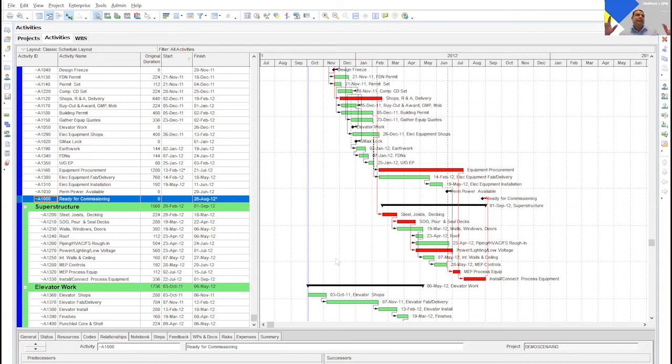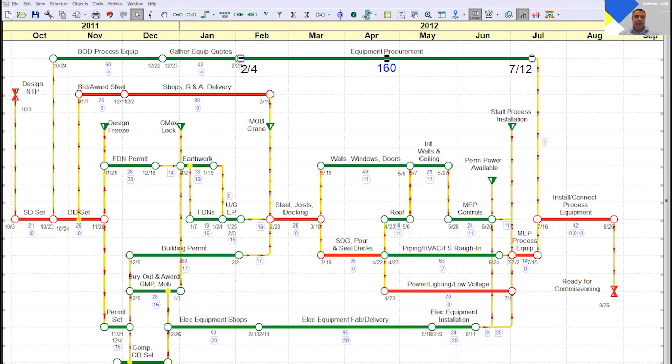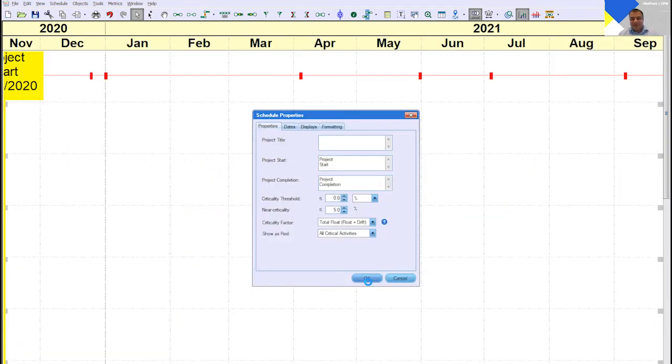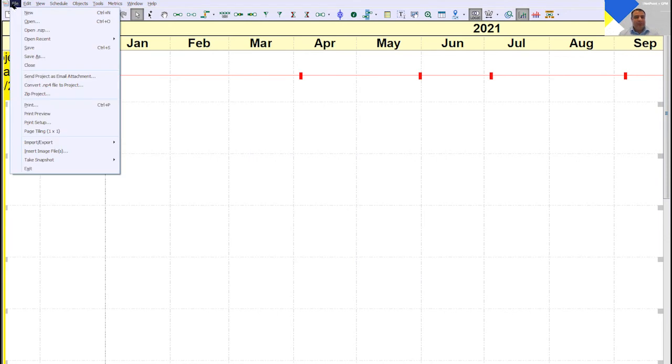It doesn't have any object that hasn't really been scheduled. Maybe you added an object, but it hasn't gotten its dates yet because the CPM forward and backward pass hasn't run. You want to do that so the XER gets the correct dates for that activity and any other related information, so you can bring it into NetPoint. Now I have exported the schedule out. I'll open a new one. You don't necessarily have to open a new one, but I like to.